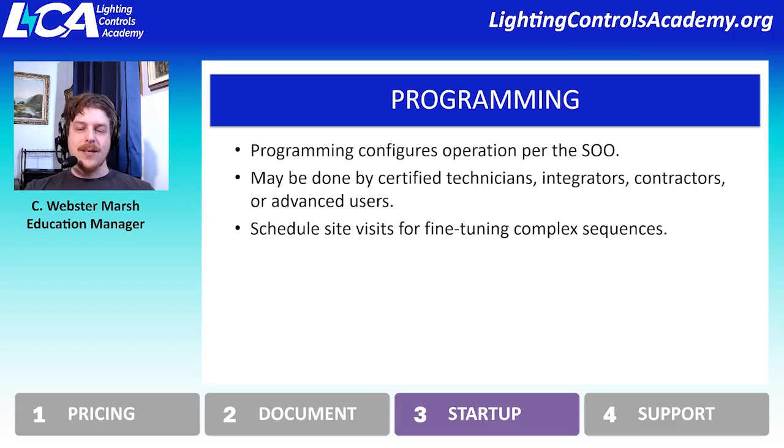But if it's really complex, if it's color changing or it has unique requirements, oftentimes you might require the owner to be present, the designers to be present, the contractor may even need to be there, IT for the building might need to be there depending. So there might be a number of people involved that might need to be present at the same time.